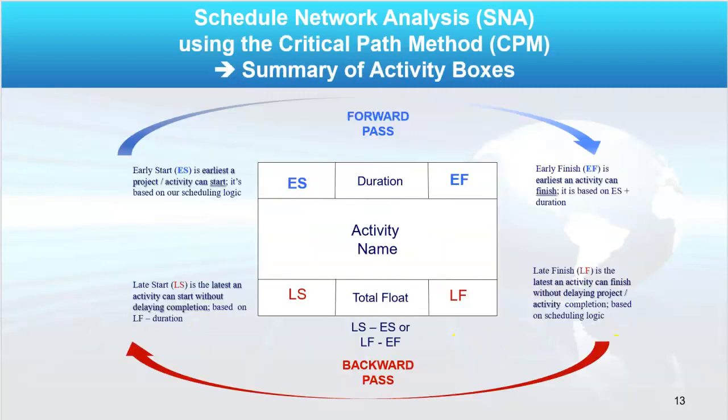Here's that box that is expanded with the definitions for you. Pause and review it at your leisure, but we've talked about it. On the forward pass, we figured out early start. Well, first we figured out the duration for each activity. Then we figured out the early start and the early finish on the forward pass and the late finish and late start on the backward pass.